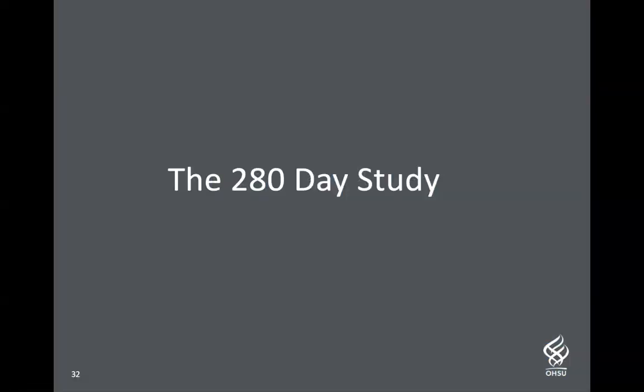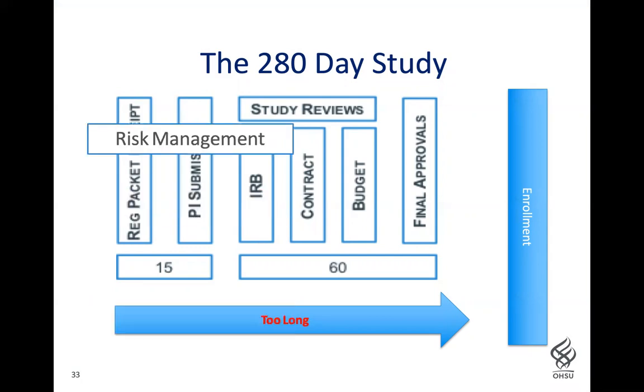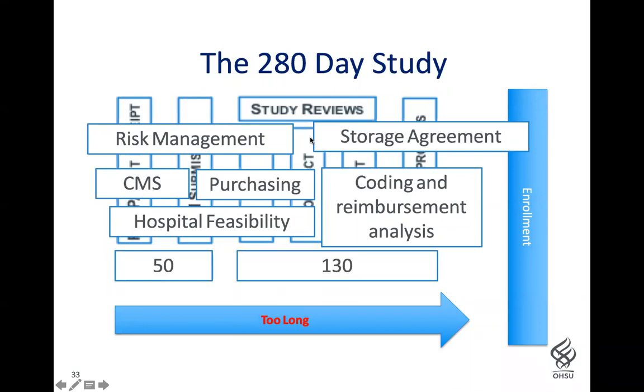This study we have now coined the 280-day study because of the timeline it took, and we quickly recognized that OHSU was not quite ready to take this on. Here's a copy of our process and our target goals. What we learned once our PI submitted the study is that there were all of these other processes we had no idea we needed to streamline for an EFS trial to be successful. We had trouble negotiating subject injury and liability language in our contract and consent form, which led to a 50-day timeline from reg packet receipt to submission. And with the study reviews, we made it to 130 days when the sponsor finally pulled the plug on us.